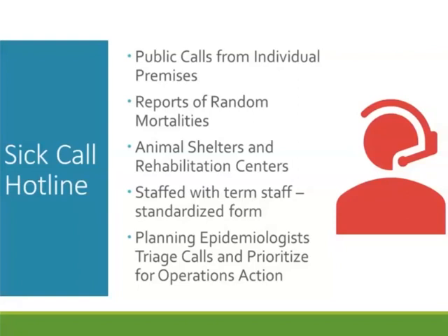And they did use a standardized form. Once they received an actual true sick call where people were reporting clinical signs in their birds, they filled out the form with all the information. The form was designed with the epidemiologist so they would capture the same information for every call. And then the staff from the sick call line would hand walk that form over to the epidemiologist, where they would triage the calls and prioritize those for operations.